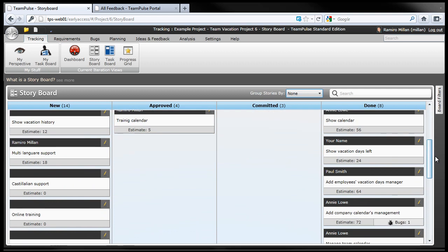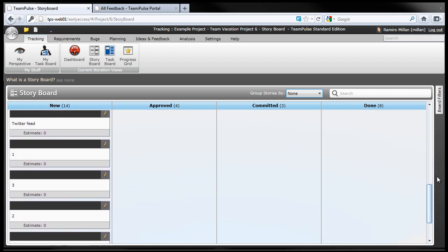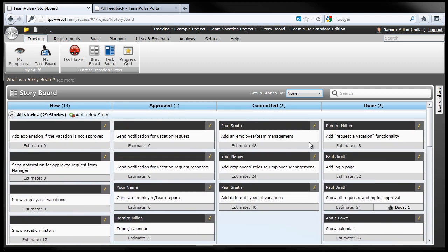And if I take a look at this, it's a nice visual way to understand, hey, a lot of content is new, some stuff's to prove, a lot of stuff is committed, and some stuff is done. That makes me feel pretty good, right? It's the beginning of the project. This is what it should look like. If further down the line it's getting towards the end of the project, then this might make me start raising some questions as to what's going on. How come a lot of stuff is new? How come a lot of stuff is not done yet?